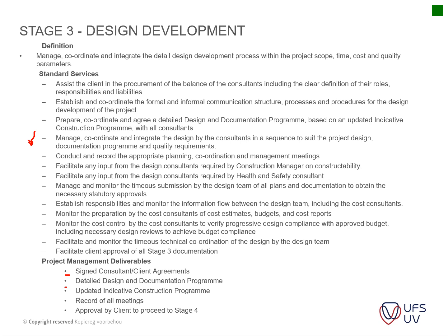Update in indicative program, okay, the construction program. So now you start conceptualizing your program a little bit. Now you incorporate, for instance, the civil work should take place first. So you would divide your program into the large items that have to take place. Like for instance, your civil works, water reticulation before you actually break ground for your buildings, etc., etc.